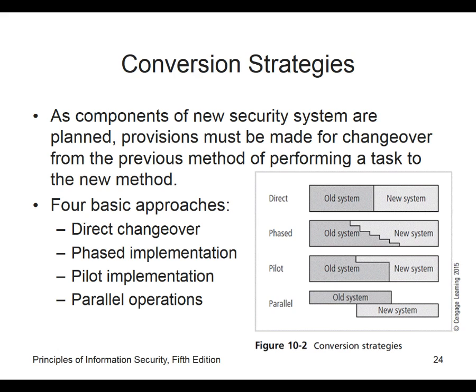Well, what do you think happened when they put the new system online? They contacted me and said, all right, Ken, go ahead and convert your data. No. What do you mean no? I said, you're going to do it. No, we don't do that stuff. So you need to go back and look at the quote, because it specifically said in there, conversion of data at no cost. They were so mad. The salesman who sold it didn't get clearance from anybody. He's like, oh yeah, we'll just convert your data, no problem.